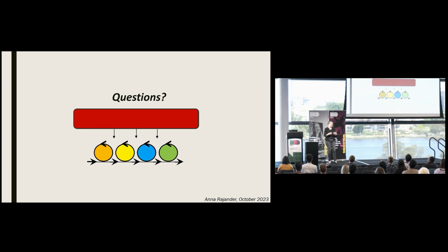Inevitably, where I've had success in government, particularly in health, there's been a waterfall overlay over any agile initiative in order to create those gateways and approvals so that the managers feel comfortable with that. Particularly when you're talking about patient-facing systems, because that's a bit sensitive, and there's all the things you need to do to get safety and approval from clinical people. So there's always that waterfall process overlay.